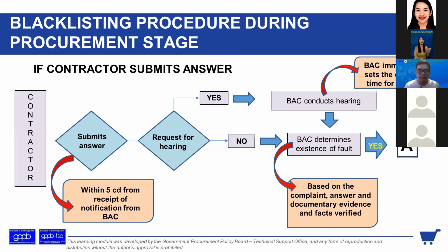At the level of the BAC, they will check if there's a request for hearing. If there's a request for hearing, the BAC shall conduct hearing and shall immediately set the date and time of hearing. Okay? Pag may request for hearing, hindi pwede sabihin niyo, you can request for hearing, tapos pag may request for hearing, we denied. No, hindi niyo pwede i-deny yung request for hearing, pag mag-request.